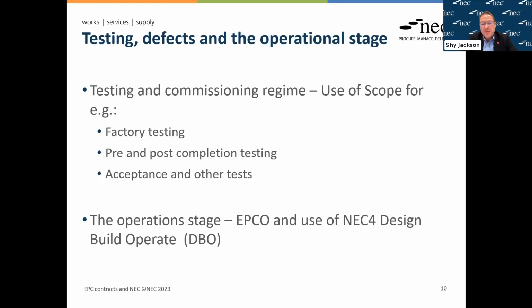I have seen examples where the Z option clauses are used in order to deal with testing or commissioning. It's usually done more as a high-level principle rather than provide all the detail. And I think it's done as a way to highlight the importance of that stage, but also sometimes to cover how it may relate to takeover or completion.